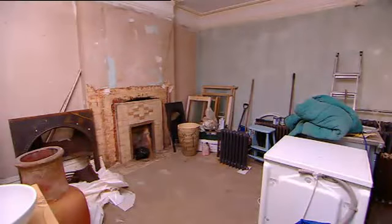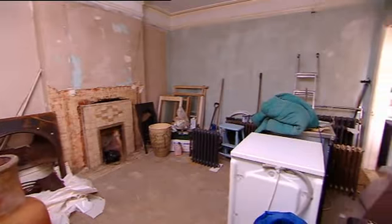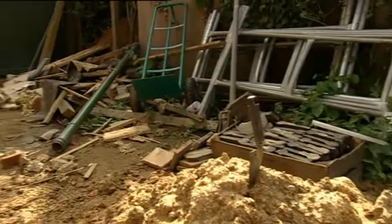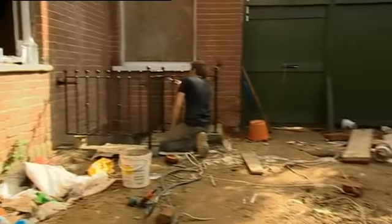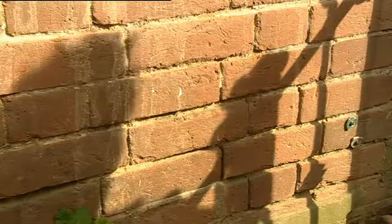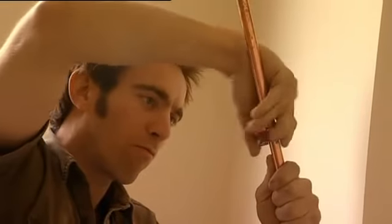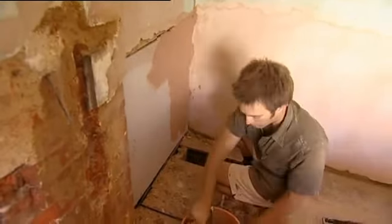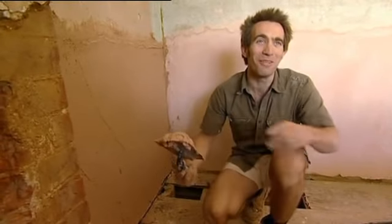Because in 2 weeks this property is supposed to be on the market, but that's looking very, very unlikely. Mike's been working as project manager, chief labourer and skilled worker, but he's barely even started on the plumbing and plastering. I think I've done all right, but I definitely recommend using plasterers who know what they're doing, I guess.